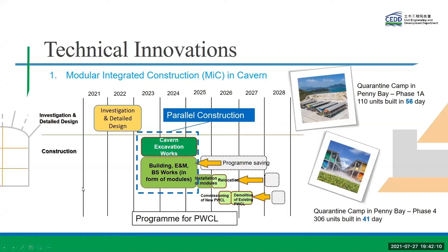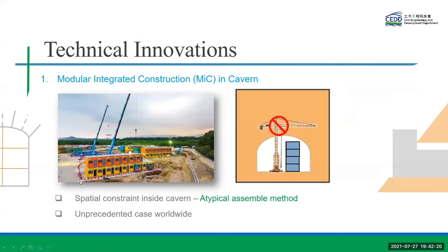This could be a perfect solution to expedite our construction progress by almost 1 year, and as such, our project milestone can be met ideally. One of the key concerns of using MIC is whether we could assemble the MIC element in an effective way inside a confined cavern space.